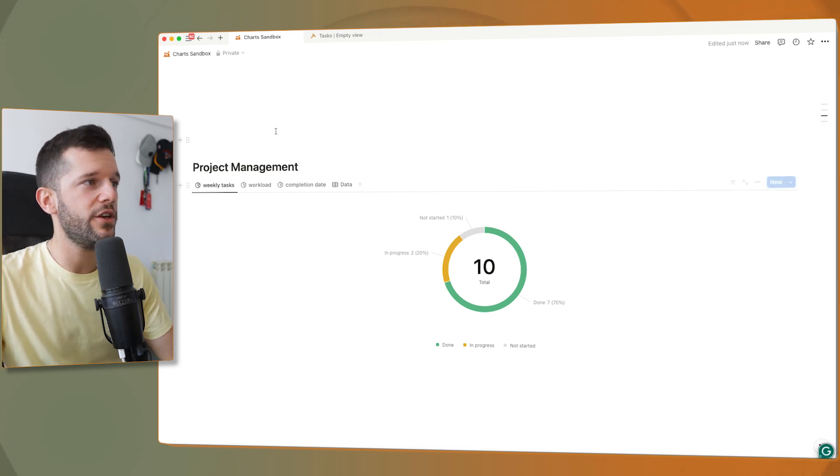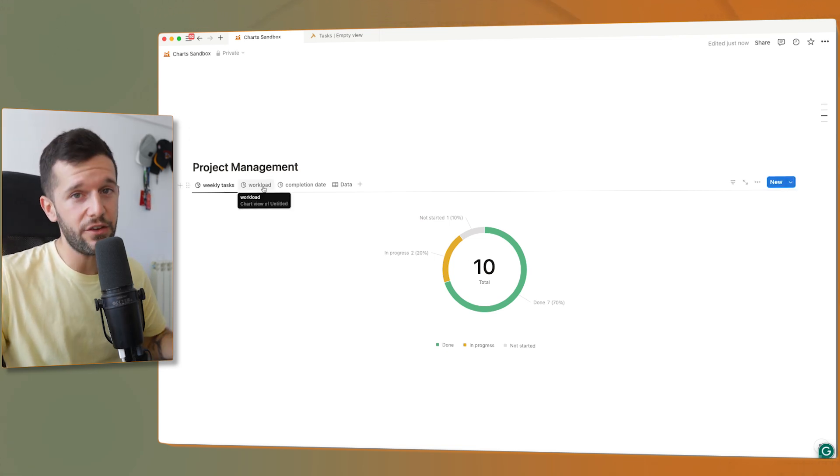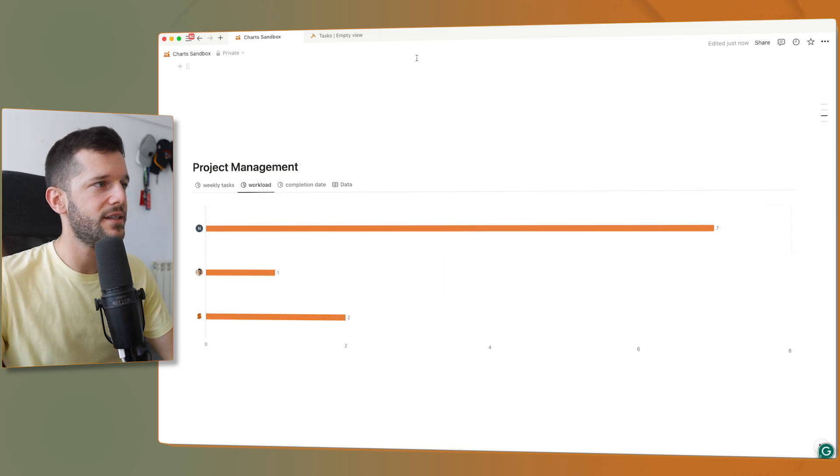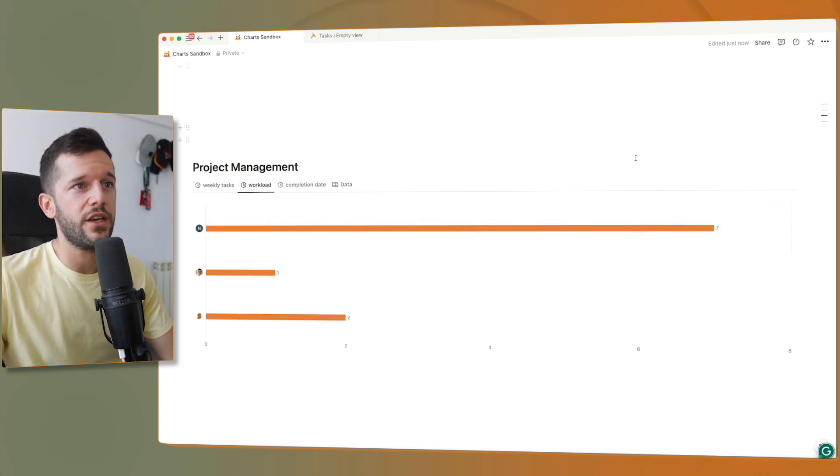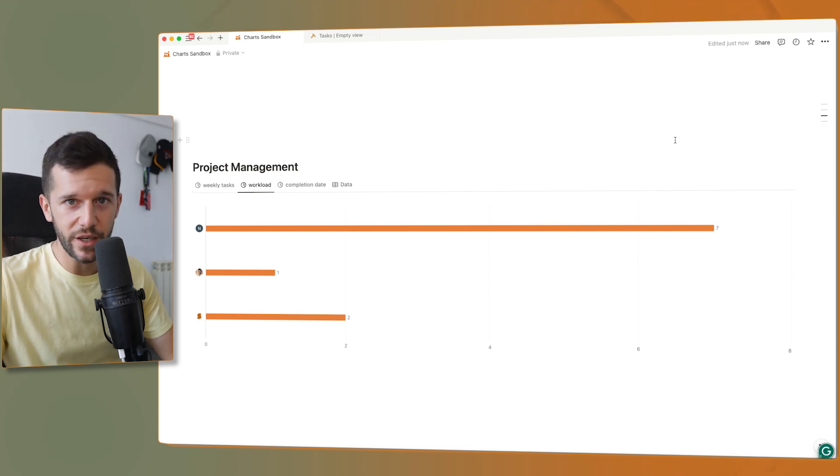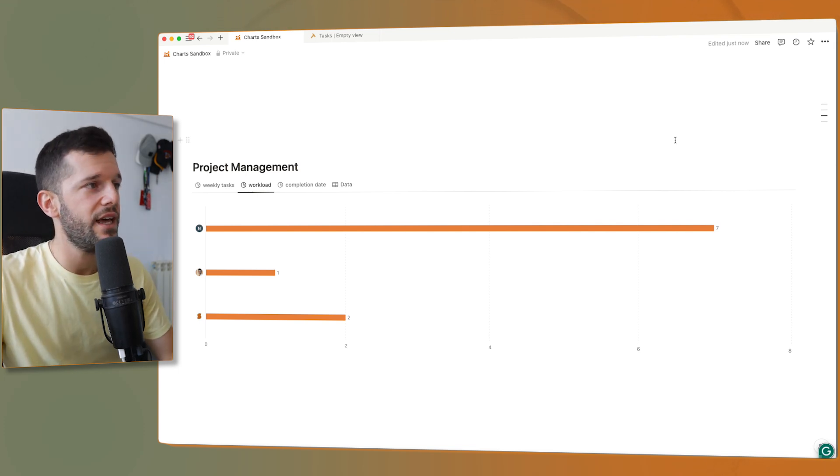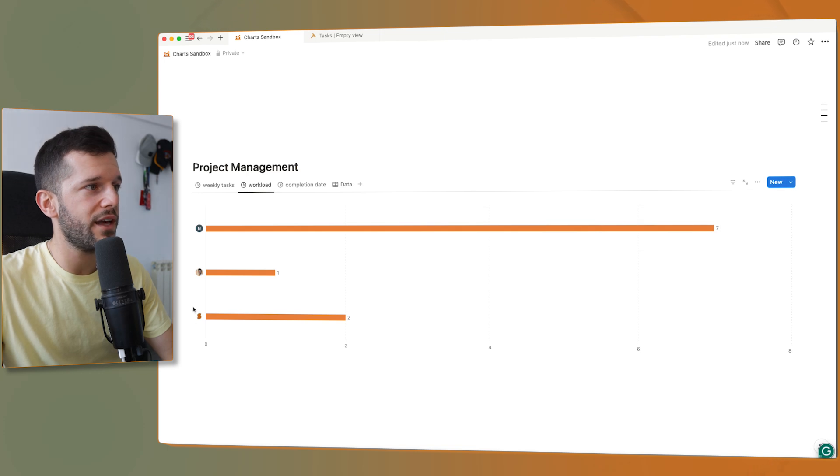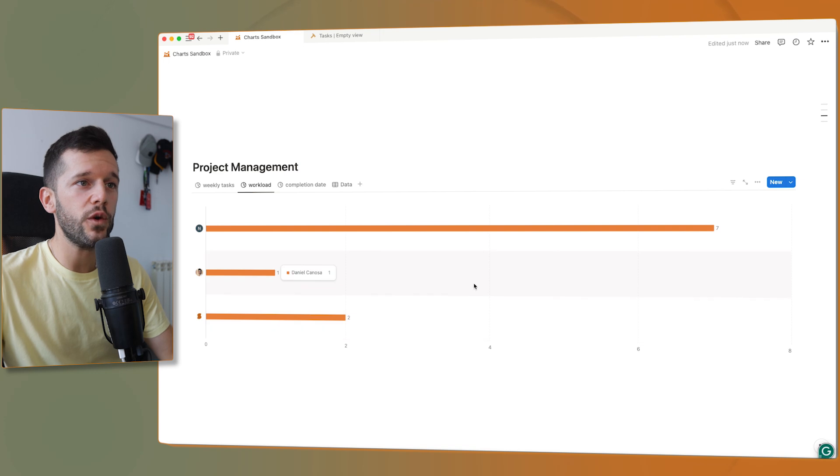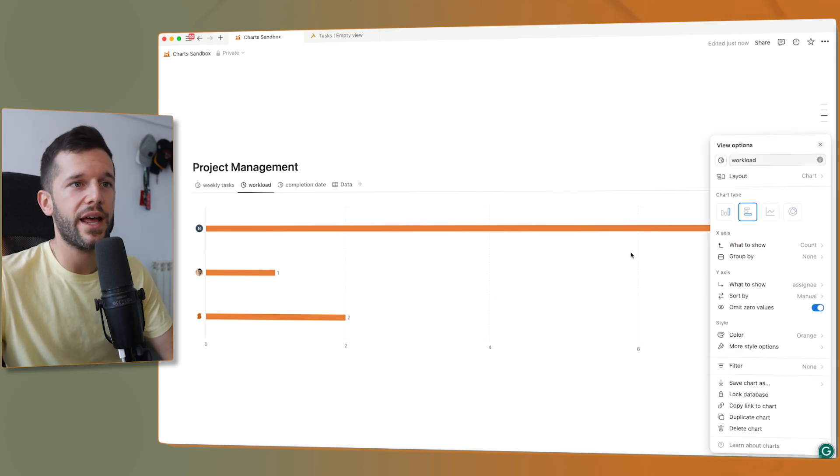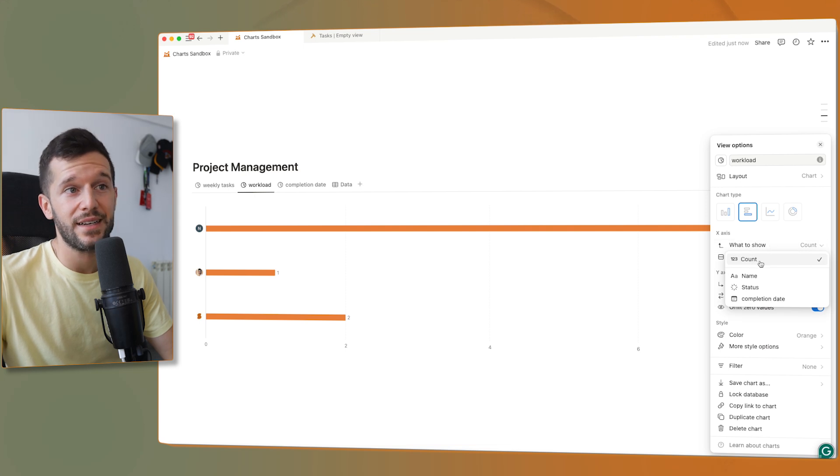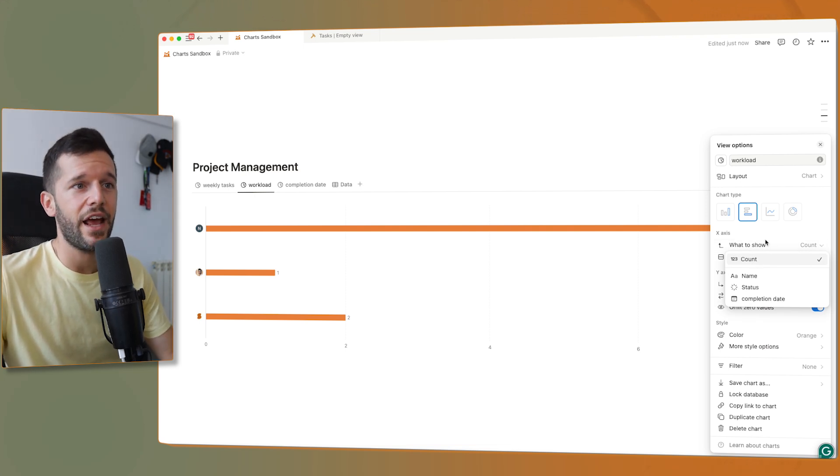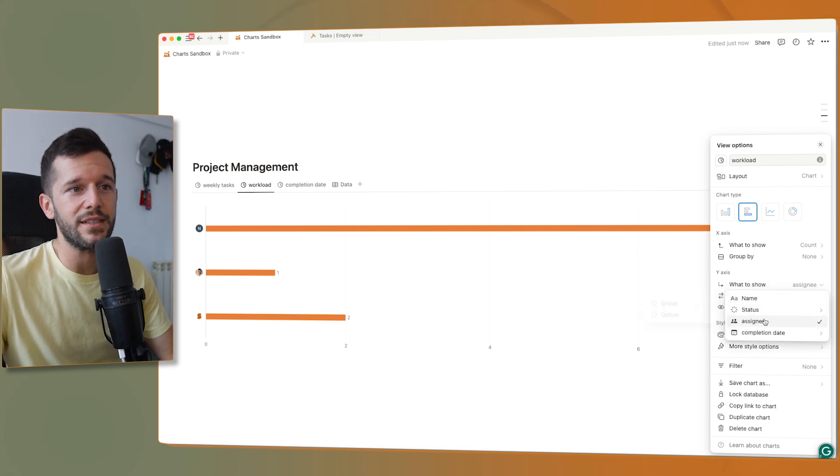Another use case that I like a lot, if you're working with a team, is to see the workload. So here we can filter tasks by this week, all the tasks that are due this week, and we can then group by person, by assignee. Like this, we can see who is the most busy. The way that I have set this up is in what to show, I'm just counting because we are counting tasks. And then on the y-axis, we are showing the assignee.